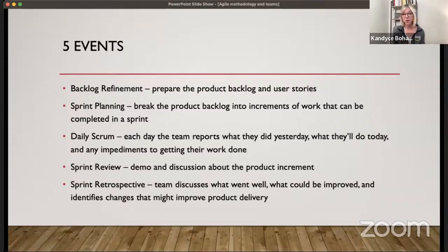Remember, our sprint is 1 to 4 weeks. And at the end of that sprint, we want to have something that is incrementally shippable. We want to have a piece of working software that can be tested. So that is what happens in our sprint planning. We take our big backlog and pull off a few things that are doable in a single sprint.